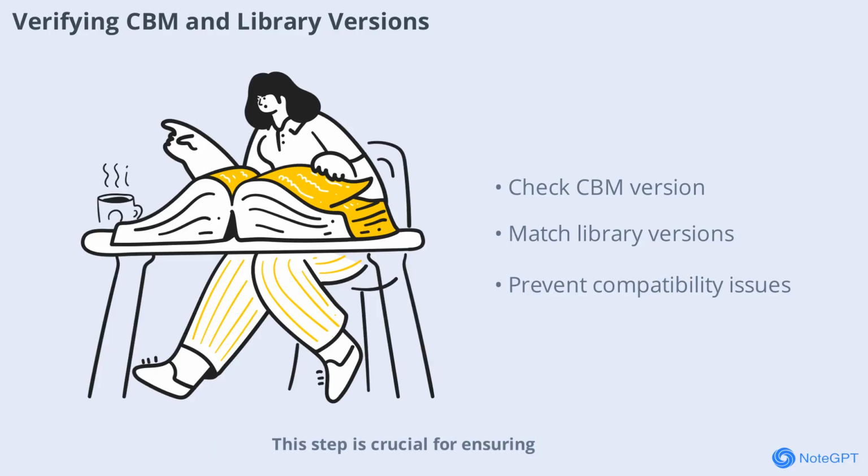Next, verify that your CBM software and all library versions match the design specifications. This step is crucial for ensuring compatibility and preventing issues during commissioning. Mismatched versions can lead to unexpected behavior or even prevent the project from loading correctly.